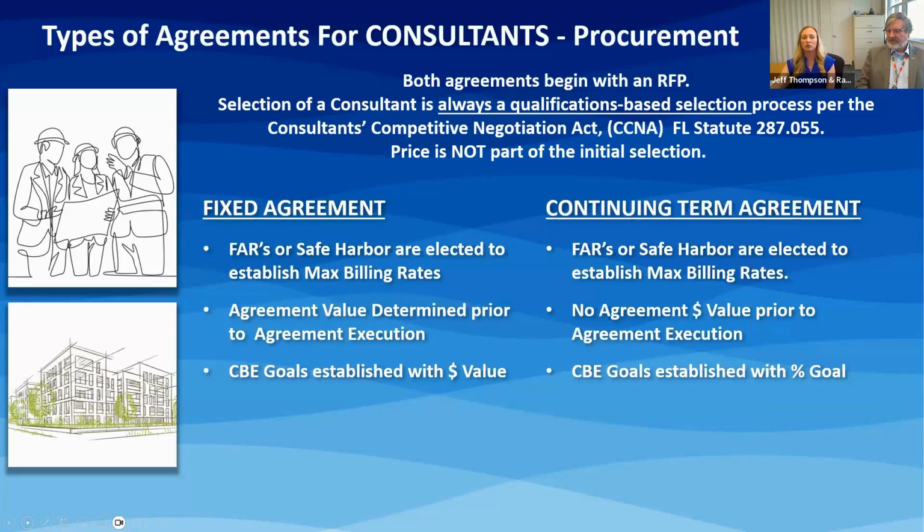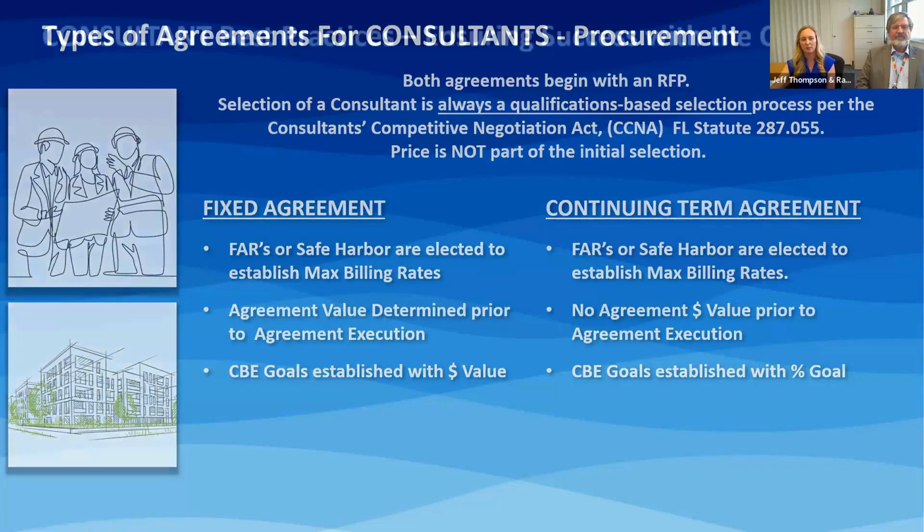Consultants, this is very critical, consultants must use the team of sub-consultants listed in their agreements. If additional scope requires a new sub-consultant, the consultant must request approval from the contract administrator to add them to the agreement. The consultant must provide the firm's credentials such as resumes and company brochures, and also complete the maximum billing rates, which will be negotiated and modified into the agreement. Next.